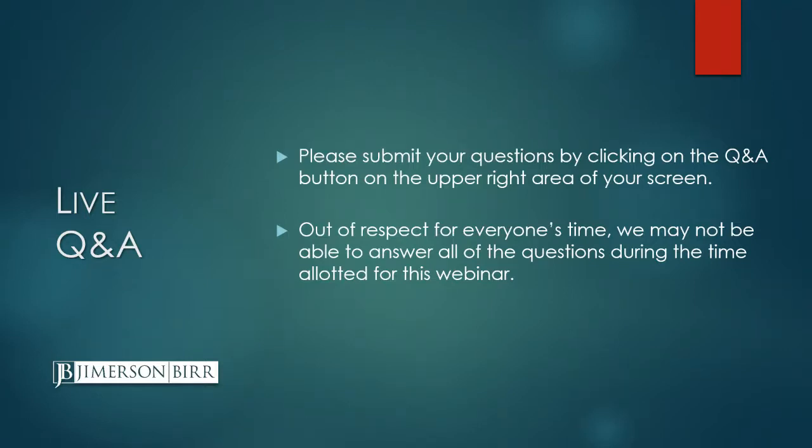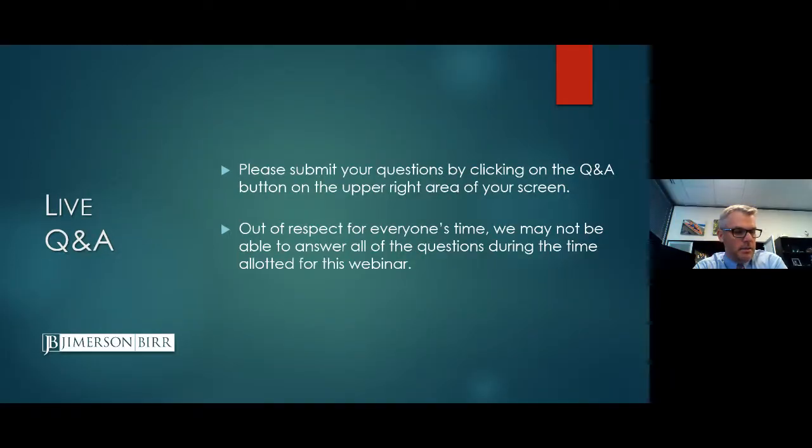That's an excellent question. You need to, again, going back to my part of the presentation, make sure you understand what the general contractor is asking you to do in connection with the change order. And to the extent that you have previously reserved claims for which you've not been paid for extra work, whatever it is, you're going to need to have a discussion with the general contractor to avoid any argument that those prior claims are not released.